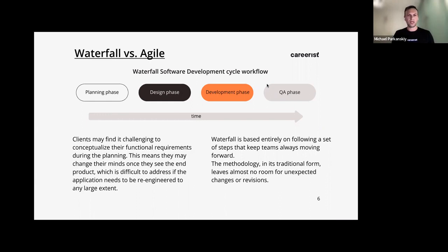Because with agile, you'd be able to make this plan. Even if you got these requirements in, you go to the design phase, and you can show the design to the customers. Hey, does this design work for you? Is this okay? And then they can approve it, and you can go back to development. You can start developing it, and your developers can say, look, one server is not enough. We need a couple more servers. And you didn't have to wait 6 months to get to the QA phase. You could have gotten this information in 3 months, because you've already started developing, and developers uncovered this, and you can go back to the customer and get that feedback. So it's much, much quicker.